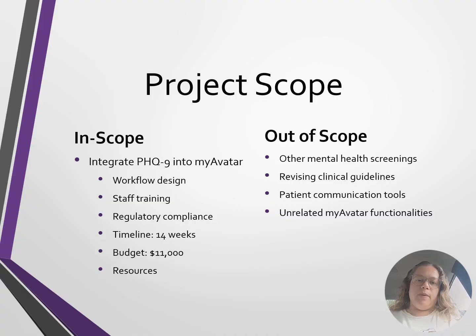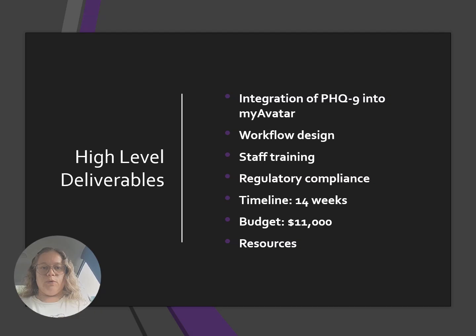Manual processes such as paper-based administration are out of scope for this project. We will not be looking at other mental health screenings beyond PHQ-9. Developing or reversing clinical guidelines unrelated to PHQ-9 results is also out of scope. We will not be implementing patient communication tools like MyChart messaging unless directly linked to PHQ-9 follow-ups. Finally, we will not be overhauling unrelated My Avatar functionalities or addressing non-specific IT issues.